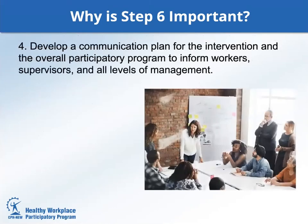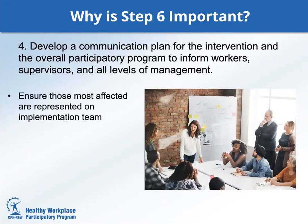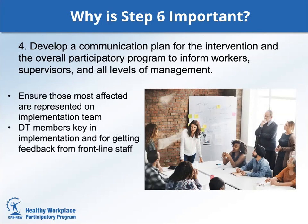Four: develop a communication plan for the intervention and the overall participatory program to inform workers, supervisors, and middle and upper managers. Ensure that stakeholders whose jobs or work processes will be most affected are represented on the implementation team and trained as needed. Design team members should serve as key contacts, explaining planned implementation steps and providing feedback from frontline staff to help identify and resolve barriers.